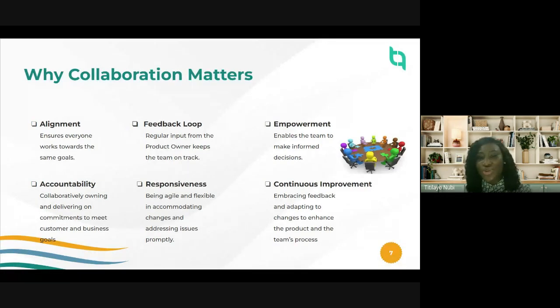And at the end of the iteration, we have something called the retrospective. You review. So at the end of every iteration, we review what the team has done. There is the demo. There is a check. What exactly have we done? What challenges did we have? How did we resolve it? How can we do better as a team? How can the product actually do better in terms of what the business or the product is saying during the demo and the review session? So those are feedback loops that put the team together and also make them plan for the next iteration or the next pre-planning.